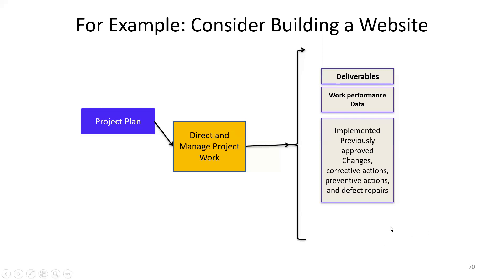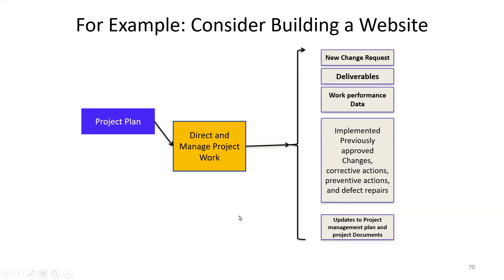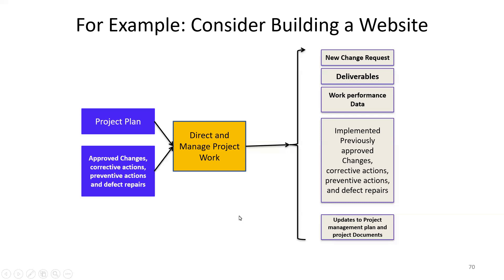As a lot of work gets done, we update project documents and the project management plan. If a new change request comes in, approved changes, corrective actions, and preventive actions become inputs again to Direct and Manage Project Work. For example, on the website someone might request a color change or button repositioning — those are corrective actions. A slow page load or a broken login would be defects to address.